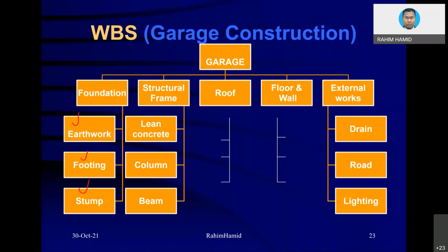can be shown in what we call the activity listing. So even inside Microsoft, inside the computer software, we normally list out these activities. But you have to be very careful in terms of putting in all the detail. Okay, if you put in too much detail, later on you might have difficulties with the updating, because every time you need to update, you need to have all the information. At the end of the day, you might abandon the updating process, because you need too much detailing, and you do not want to give the client too much detail anyway. Because the client will find a way to ask you so many questions. So don't do that. You will jerk yourself.